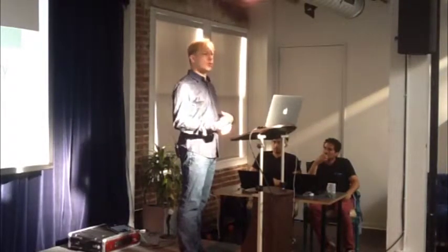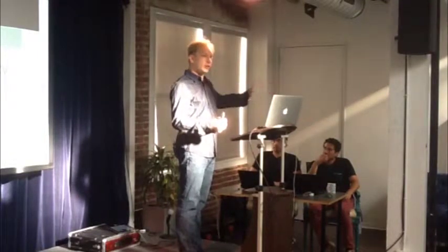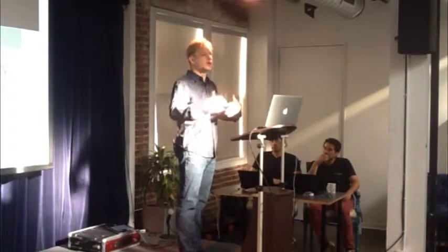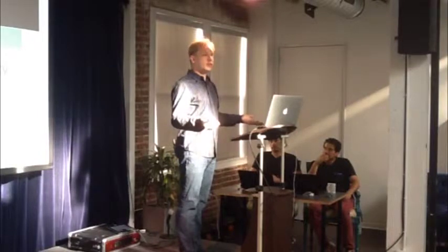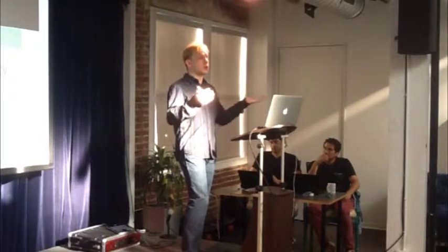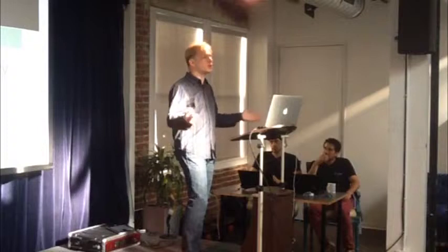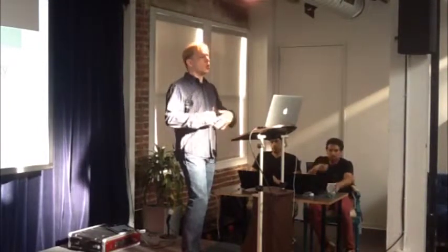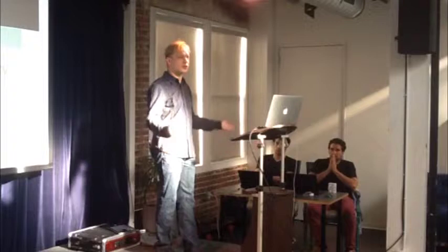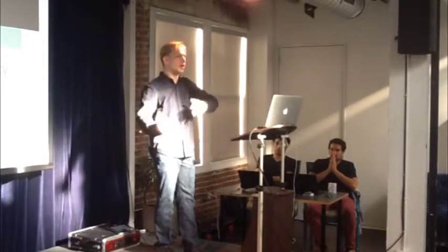As an example, we were working for a client one time who needed to use an external data provider. It was one we hadn't worked with before. It was an external API that provided data on consumers. In order to estimate its difficulty, we looked at their documentation. We found it was similar to other things we had used before. And so based on their data format, we estimated probably 10 to 15 hours to integrate it into this client's project. When we started using it, we discovered that yes, the data format was correctly documented, but the data supplier took 5 minutes to return results. This required us to build a whole architecture to handle delayed jobs and integrate that data later when it came back and show a placeholder to the user in the meantime. And so instead of 15 hours, it took us 40.